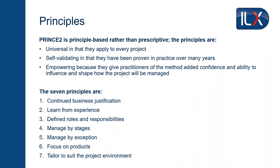Manage by stages: essentially we're breaking the project into manageable chunks — how do you eat an elephant? In bite-size pieces. The important thing about stages is they're reviews for the owners of the project, the project board, so they can go back and check justification — is this still worth doing? As a project manager, can we learn from experience and do the next stage better than the last one? It also helps planning: rather than plan the entire project in detail, PRINCE2 says have a high level project plan but plan each stage just in time for the piece you're going to do.